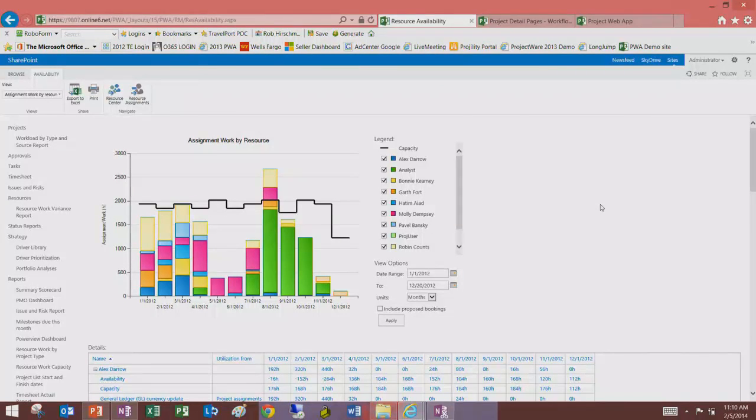And you have to follow that in real time to understand, do you have more work than capacity, or do you have certain periods where you have a lot more demand for work and you don't have the people to do the work? So what we can see is early in the year, we're right at about capacity with our actual resources. These resources are reflected over here. So we see we have Bonnie, we have Molly, Pavel, and they're working. And we can see where we have people that are probably over-allocated. Their bar chart is pretty darn big, right?